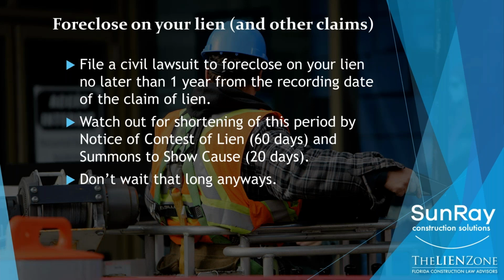Once you record your lien, then you should actively be pursuing collection efforts, phone calls, emails, letters, for usually, I recommend, between another month to 2 months on your own to see if you can get paid. If you've made the business decision that you want to continue to pursue this claim, and you're not making headway after you've tried everything, and by the way, I would even recommend getting up and parking yourself in the owner or the client's office to try to get paid, saying, I'm not leaving until I get a check. That works for some of our clients, by the way.